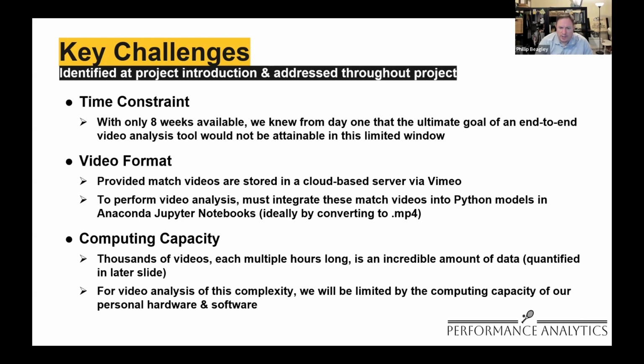And then finally, scope management was another significant challenge that we faced. Early discussions with our team and our advisors made it pretty clear that some of our initial objectives, such as delivering a shot-by-shot analysis, were probably too ambitious for our time frame. So we decided to shift our focus to smaller incremental goals that were achievable within the time.